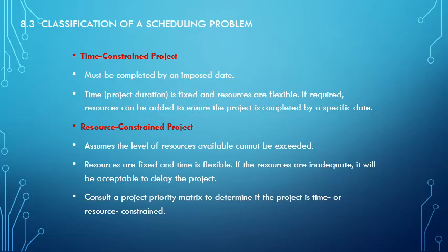Resource constrained projects would be kind of the other side of things. We only have so much available to us that we can use. And so in order to make that happen, we may have to extend our time so that those resources are able and adequate to do what we need to do to finish the project.